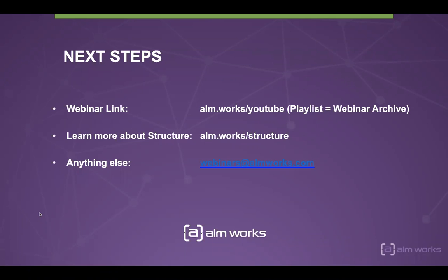There's a bit of a lag just because the data needs to go from the Jira instance to the Confluence one, through the application link. So we've noticed that they are a little slower, but not significantly. The one thing to keep in mind, though, is that Confluence users don't necessarily have all the permissions that the Jira users do, especially if you're a large organization and you have, say, management that you're reporting to. They're oftentimes only viewers on Confluence and they don't really play in Jira.